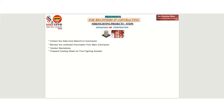In the fourth step, we need to start preparing the cost estimation separately for materials and also for the installation. We are going to make two sheets: one is for the material, called the material costing sheet, and the other is for labor, called the installation sheet.